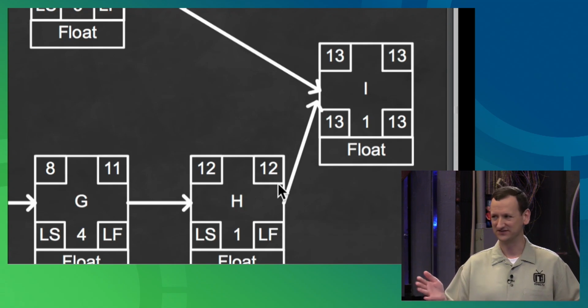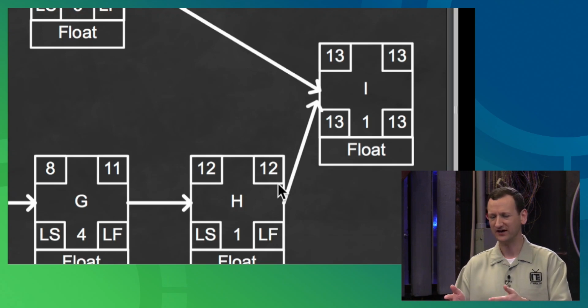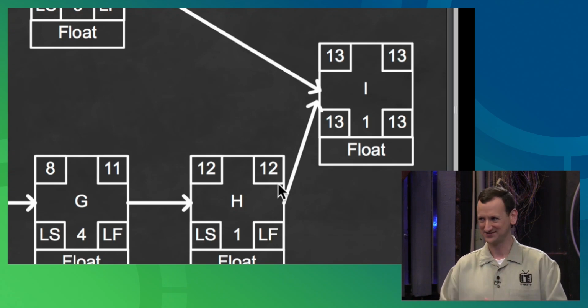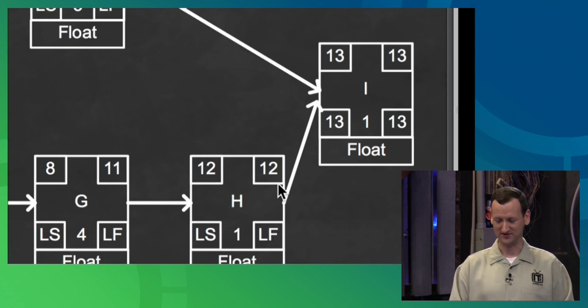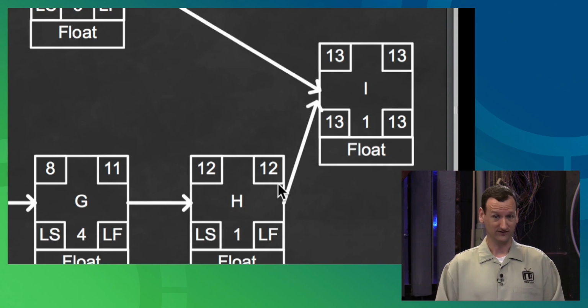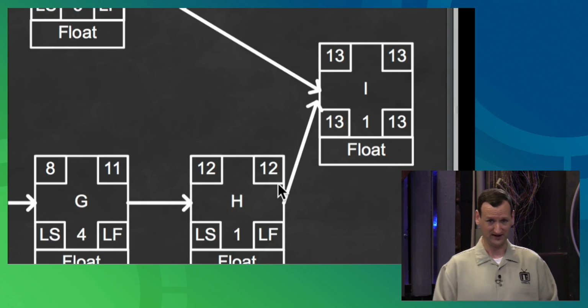The first and the last activity, you don't have float. But where it can be a challenge is not every project rounds off into one nice task like this. You might have a project that ends in 4 different tasks. It's unfortunate, but it happens. And in that case, you might need to calculate float on those, right? So don't just assume you don't need it.